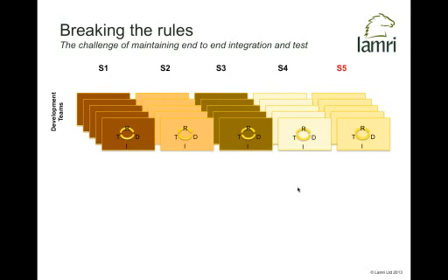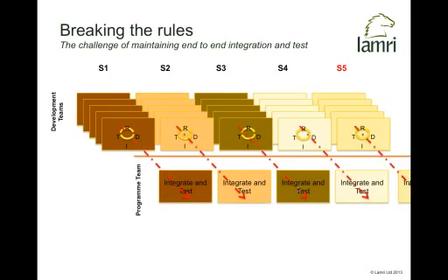What about end-to-end integration and test? If you've got a number of teams running in parallel in each sprint, that can be interesting, because each team will test their own subsystem or slice of functionality, but who does the full end-to-end? Sometimes, as I said, the program team gets that responsibility, but sometimes you've got to slip that full end-to-end test into the next iteration. So for example, in sprint 1 we're doing the final end-to-end integration and regression test during sprint 2. So things slip by one iteration. If a big-picture issue is found, it doesn't get addressed until sprint 3. So issue addressing does slip.